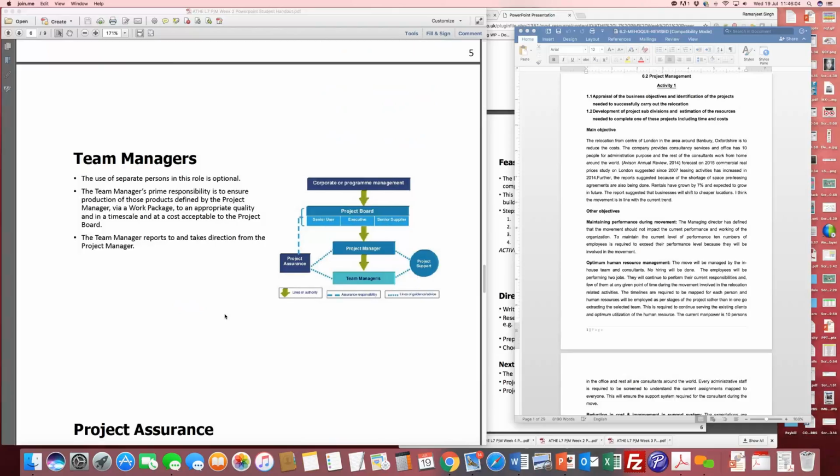Every morning there was a drill. At 6 a.m., construction started early because of the temperatures. It used to stop at 11 o'clock. Then construction used to start again at 3 o'clock in the afternoon. So these team structures were put in place, with a health and safety drill at 6 o'clock in the morning, and these roles and responsibilities became part and parcel of that whole project for a span of almost 2.5 to 3 years. There was no way this could have been done otherwise. There was not a single day on which the health and safety drill was not done.